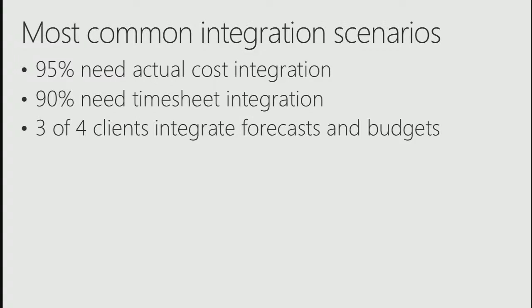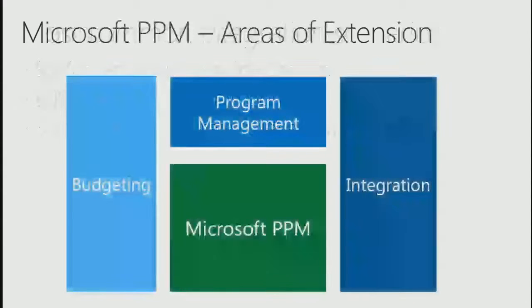And you remember the whole budgeting story? The budgeting story doesn't end with project and whatever tool we have on top, like PMCS. Budgeting needs to be aligned with your ERP system, always, because budgets will be released there. Budget control in terms of whether you're allowed to raise any invoices for the project will be done in your ERP system, not anywhere else. So this is something which is very important.